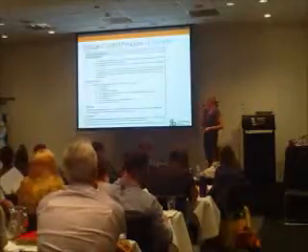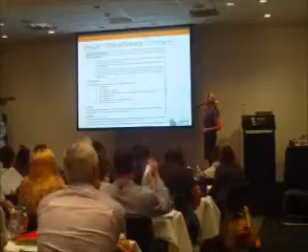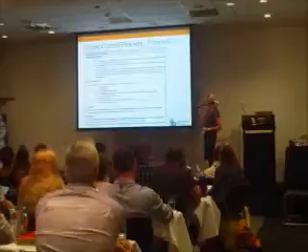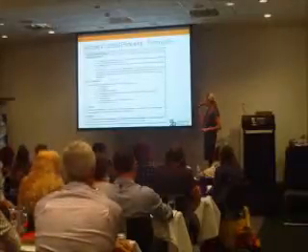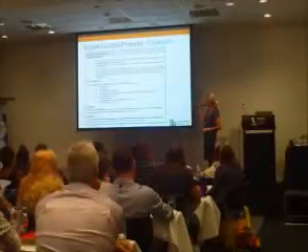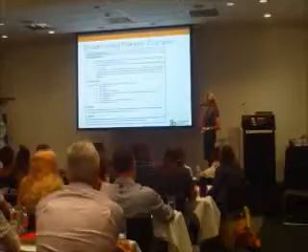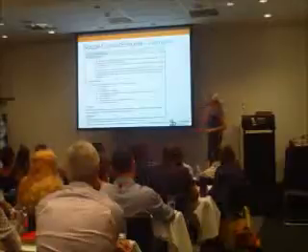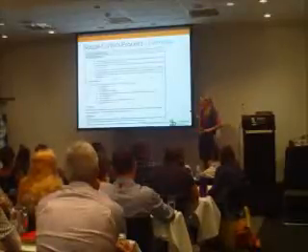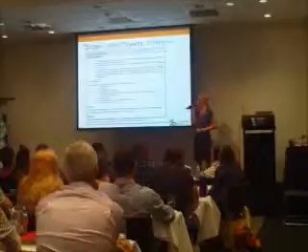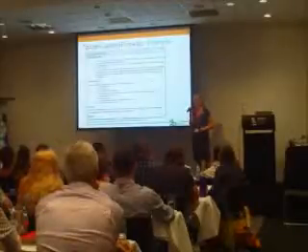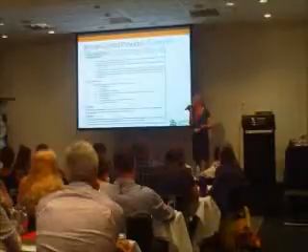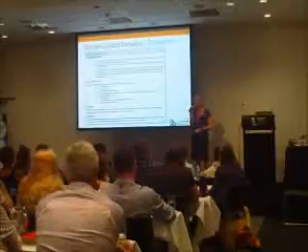This is an example of a process. Number 3, in the instance of a safety risk, implement any necessary and appropriate action immediately with the assistance of the Workplace Health and Safety Officer. If possible, and retrospectively complete a variation request form and provide it to the project manager. How long is this sentence? Within 1 hour of the action being implemented. So, if it's a safety risk, just fix it. This is an example of what you could do in a control process. So your organisation would have their own standards based on that, or you'd have to make them up yourself.